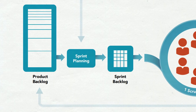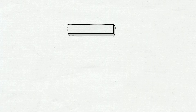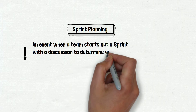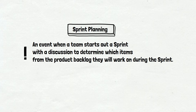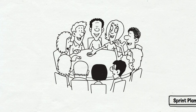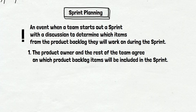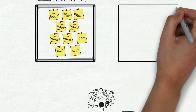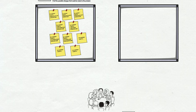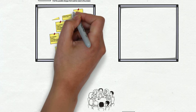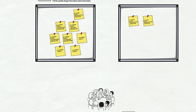Now we can move to the first item of the sprint: sprint planning. Sprint planning is an event when a team starts a sprint with a discussion to determine which items from the product backlog they will work on during the sprint. Basically, it is a meeting where people discuss two main topics. First, the product owner and the rest of the team agree on which product backlog items will be included in the sprint. The team selects items from the product backlog they plan to develop and deliver in the next sprint — mostly two weeks' work. In our case, the team selected three items: two stories and one small bug fix from the previous sprint.